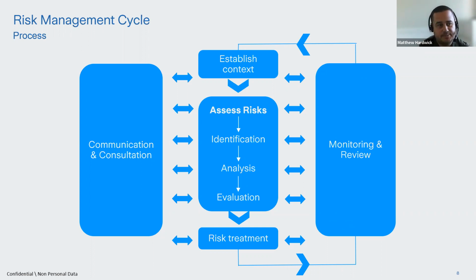The easiest way and the best way to do it, and when I'm talking at training sessions for individual organizations, I become somewhat naive and almost revert back to your 5-year-old self of asking why. Why can't we do this? Why is that? Why is this a problem? That will allow you to get into the real root cause of your risk.